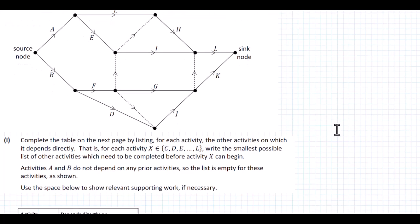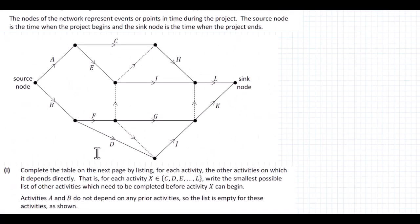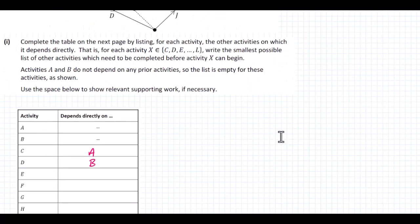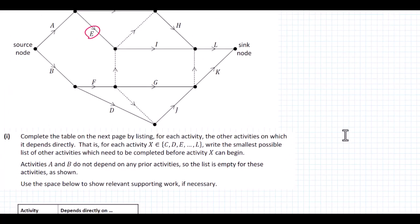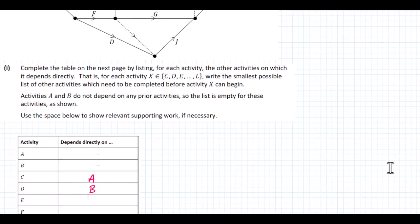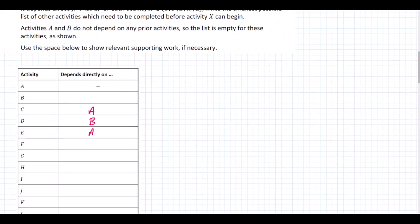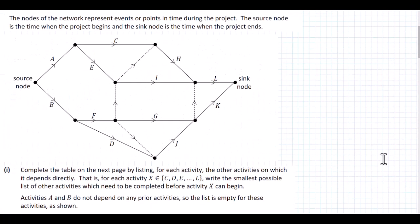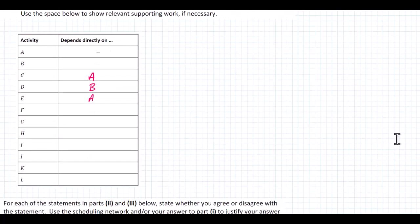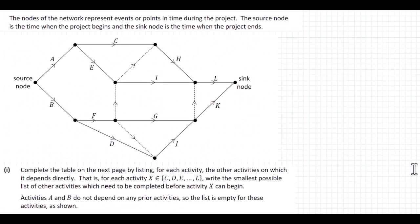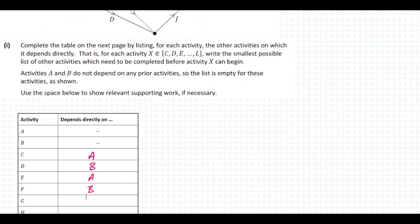So we write in A for C. D depends directly on B. E is here and depends directly on A, nothing else. F depends on just B — it just depends on B being completed. G depends on F being completed only, so we put F there.